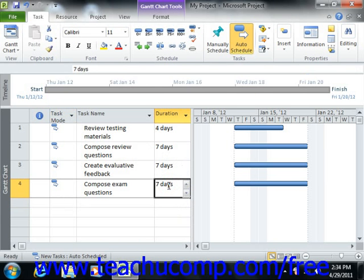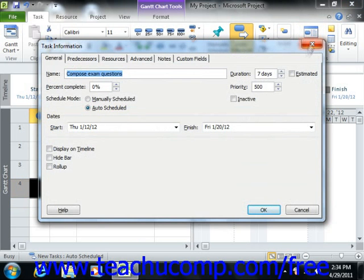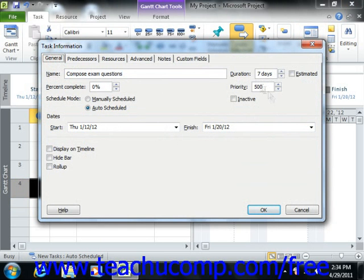When entering your tasks into the task list, you can enter the duration into the Duration column within the table view shown within the Gantt chart view. You can also enter this information into the Task Information dialog box on the General tab if you use that method of task entry.